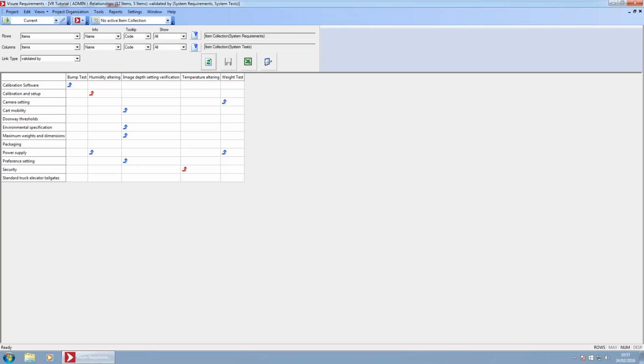I can do that after performing the change, or even I can simulate the change by just modifying the element, perform the corresponding analysis, and afterward I can proceed with the change or just go back to a previous version of the elements without changing anything after performing the impact analysis, the cost that is going to have for performing the change.